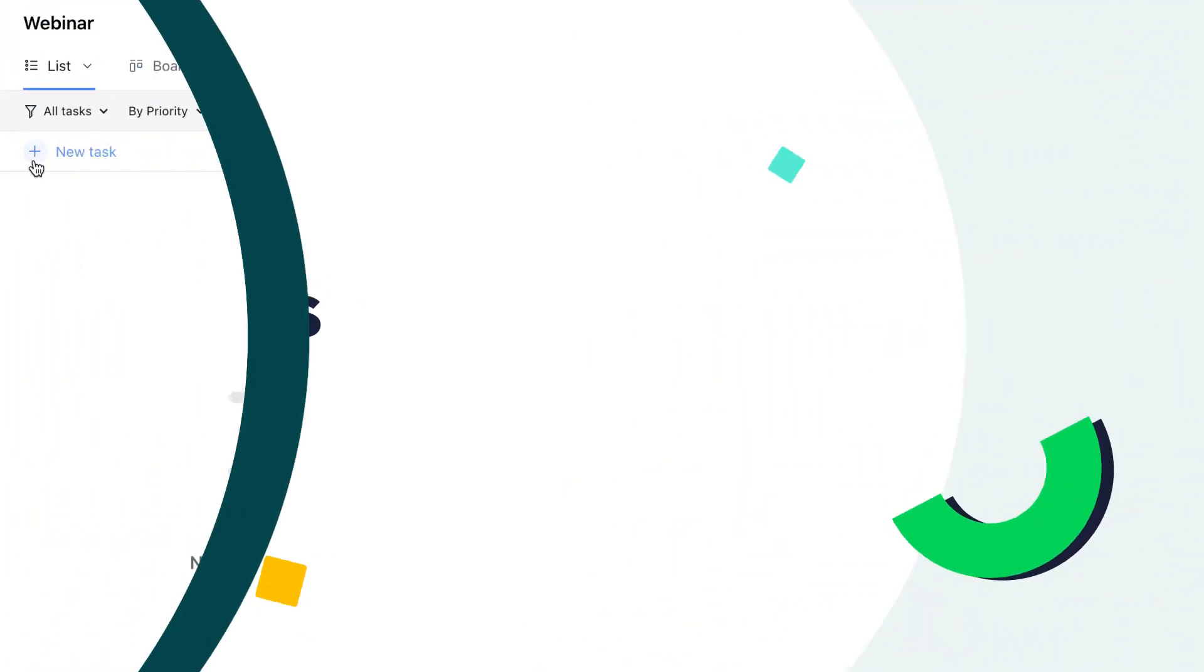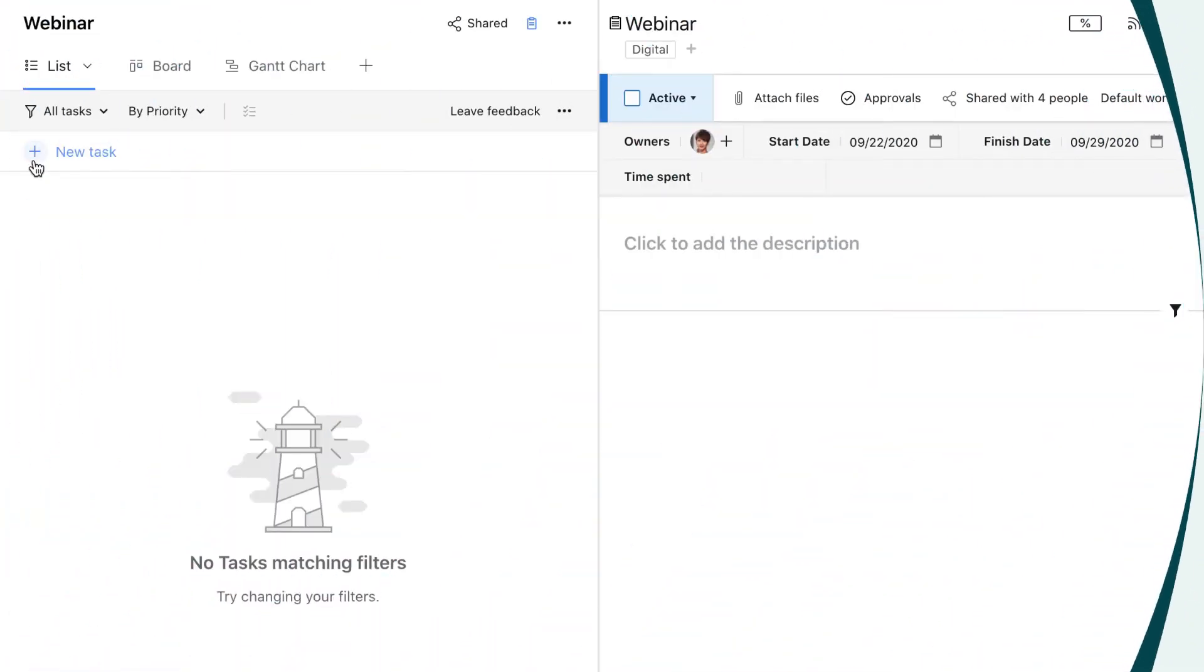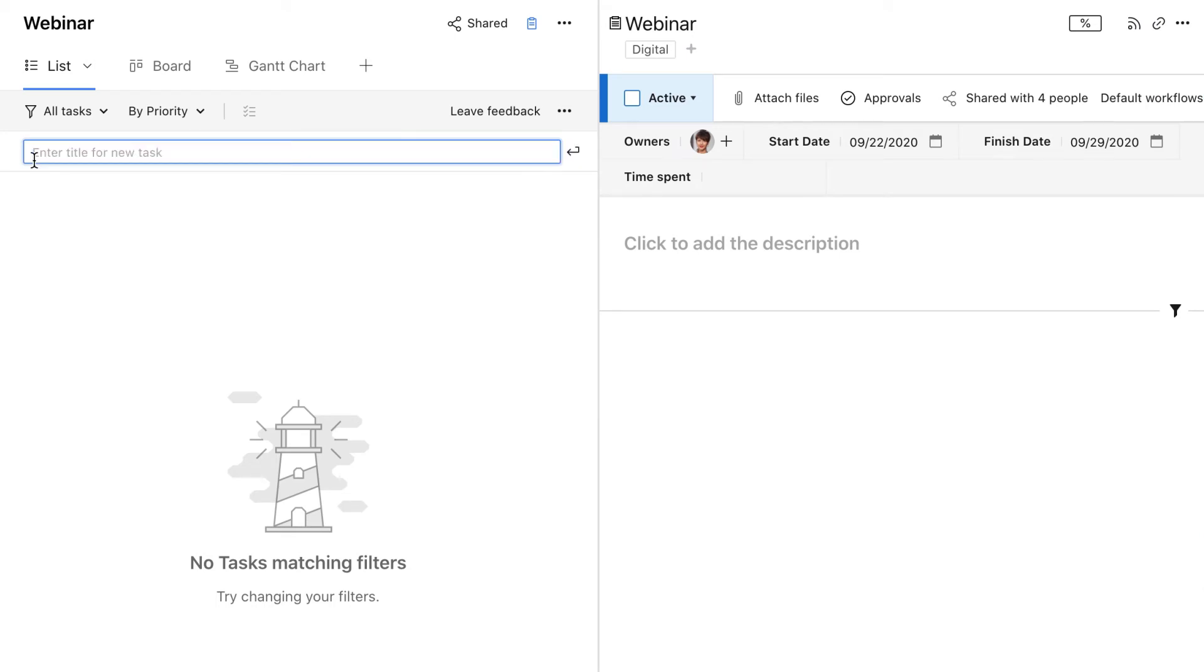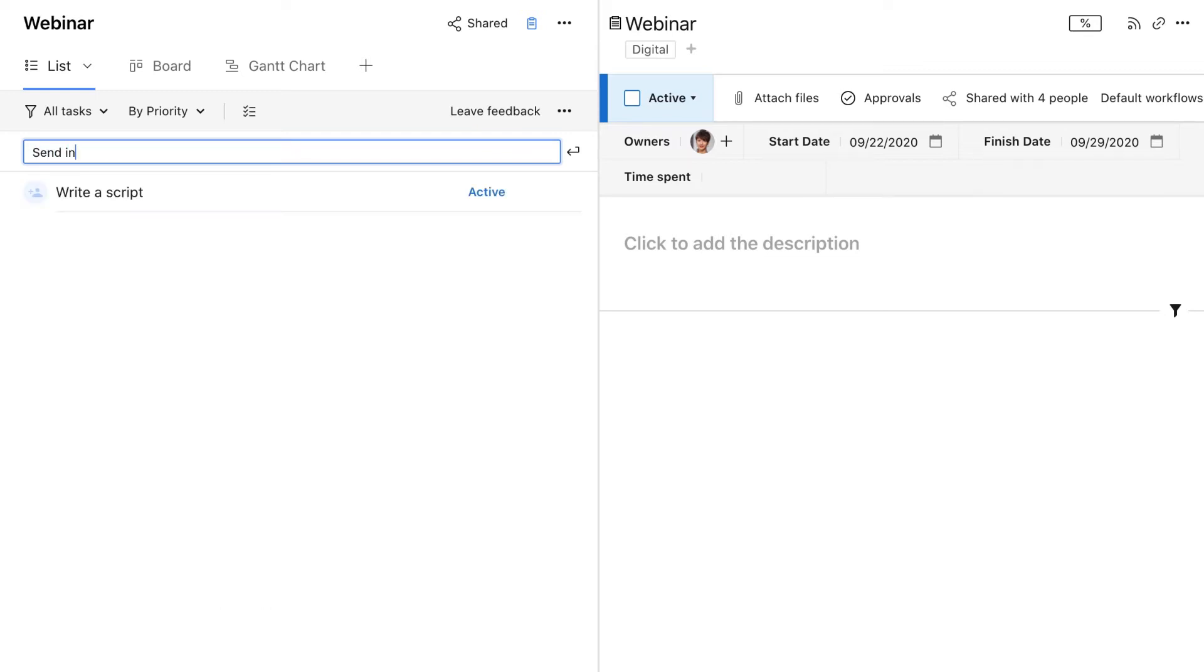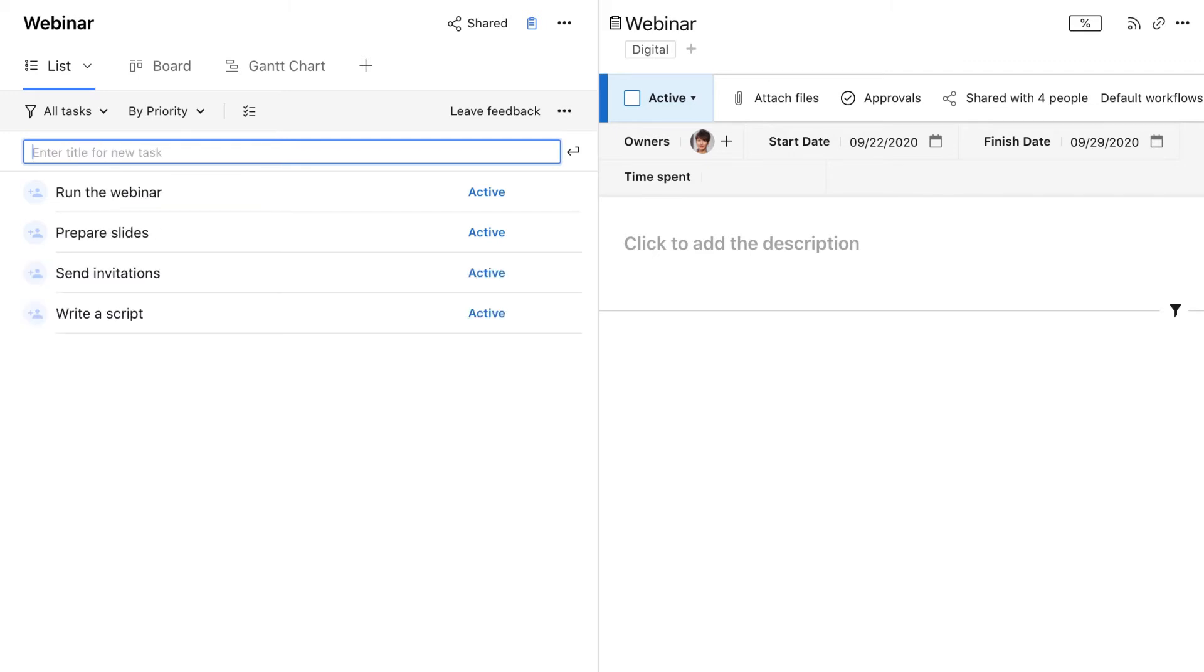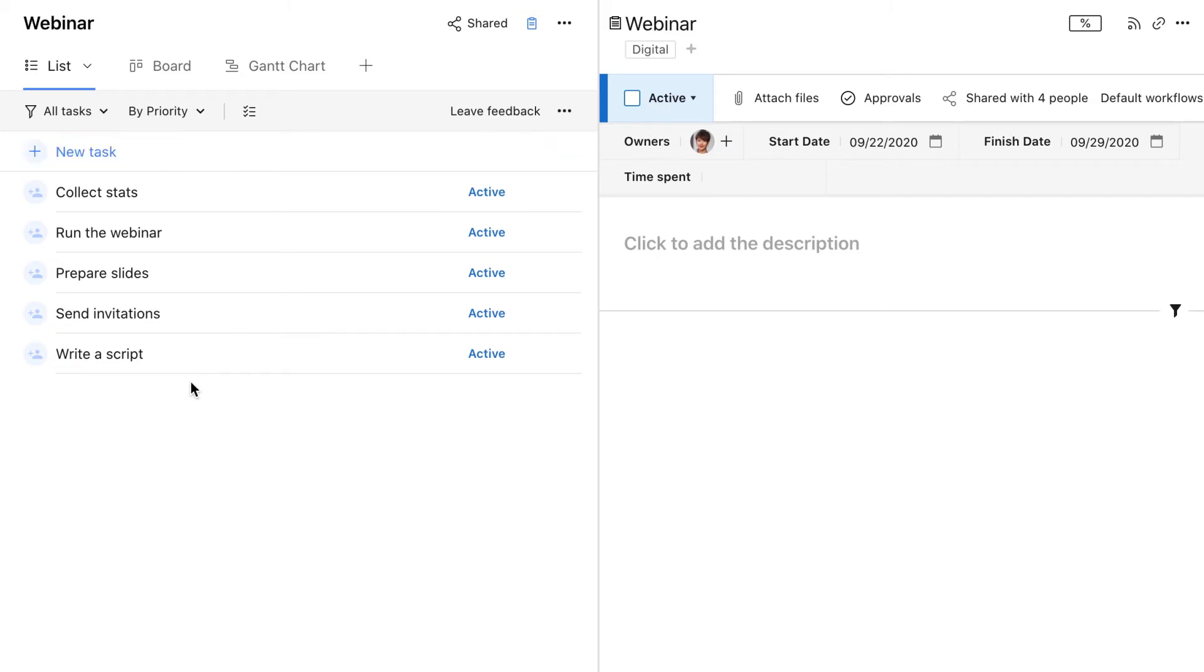Once the project is created, we need to populate it with the tasks that are required to complete it. For example, what do we need to do for a webinar? We need to write a script, send invitations, prepare slides, run the webinar, and collect stats. All the tasks are ready and it's time to assign them.